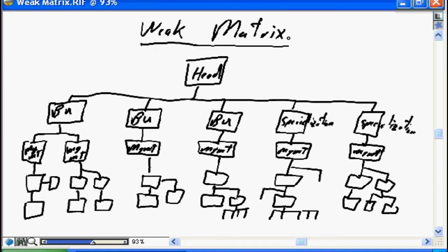The more common form of organizational structure from a project delivery viewpoint is some form of matrix structure. In this particular discussion, we're going to discuss a weak matrix. Matrix structures start with traditional functional structure. So this is the same organization chart that we discussed a few minutes ago in terms of the pure functional organization and the functional delivery of projects. The difference being, in a weak matrix, one of the business units identifies the need for a project and identifies traditionally one of the management levels as being the project manager.